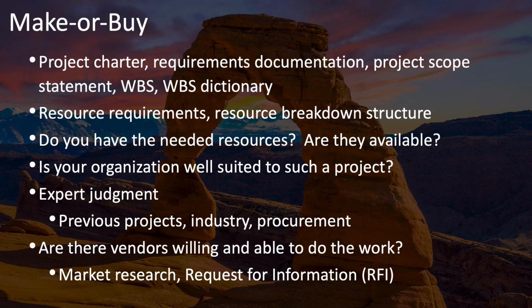Also, take a look at your resource requirements and your resource breakdown structure and ask yourself whether or not you have the resources you need to do this kind of work. And then find out whether or not these resources are available. You'll also want to consider whether or not your organization is well suited for this type of project, whether this is up your alley, if you will. To do this, you should probably consult with some experts, people who have had experience on previous similar projects, who are experts in the industry or area involved in this project, as well as those who are expert in procurement.